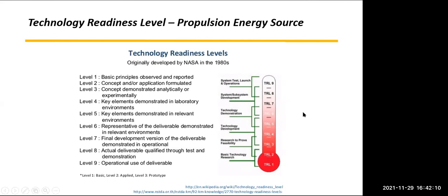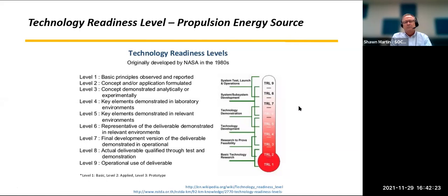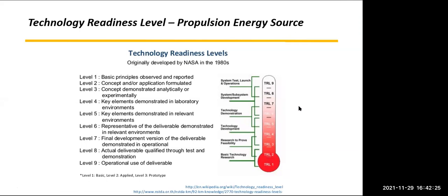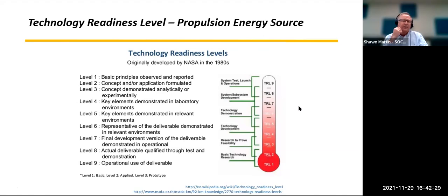I'd say it's a level 5 then, because as you mentioned before, since the critical components are at most a level 5, the system as a whole would only function as well as the critical component. Yeah, I would tend to agree with you there, because both the battery system and the sonar have been more than just in a lab environment.